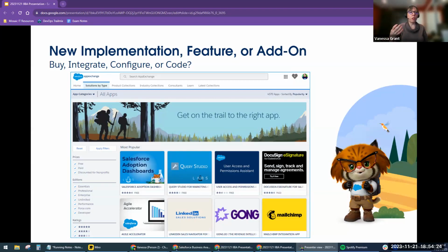The unfortunate thing is, if you don't have that strong base and understanding of how Salesforce works or what the platform can do, or the features that come out of the box, I have seen it where a BA that is unfamiliar with Salesforce and doesn't do that work before going into one of these projects will end up writing a bunch of user stories that will lead to a bunch of custom code, which will lead to a bunch of maintenance nightmares along the lines, because there's so much code, and Salesforce is not meant to be a super code heavy platform. It is meant to be a low code platform with some customization as needed.